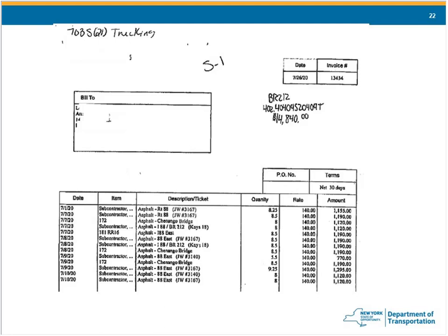If you're getting that feedback where they're refusing to give you the EMR documentation, too bad. It is a requirement of the department. So if that feedback is coming, they don't want to provide that to you, then we can't negotiate these additional items of work. If you need assistance on that type of issue, you can reach out to your regional change order specialist or main office.